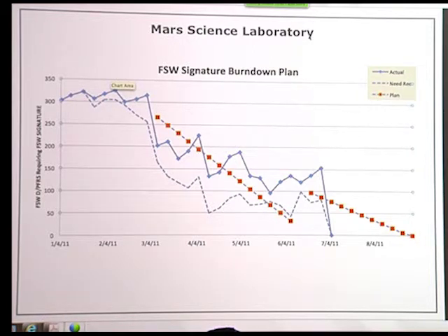So we had a lot of problems, of course, because it's a separate tool. There's the overhead of dealing with two different tools trying to track perhaps the same problem. We used the JIRA system as a change request tracking tool as well. So we had multiple issues if it was fixed in multiple modules for the same problem, or even multiple versions of software after we had branched off for EDL or things like that.